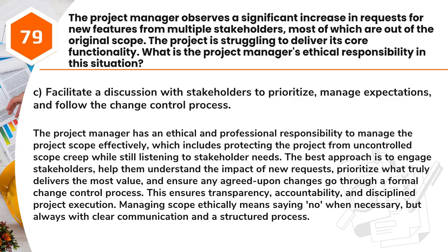The best approach is to engage stakeholders, help them understand the impact of new requests, prioritize what truly delivers the most value, and ensure any agreed-upon changes go through a formal change control process. This ensures transparency, accountability, and disciplined project execution. Managing scope ethically means saying no when necessary, but always with clear communication and a structured process.